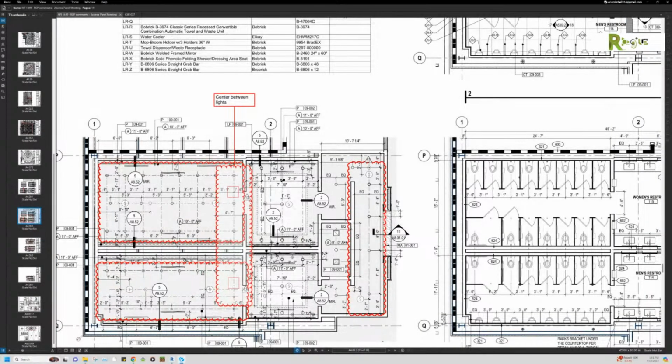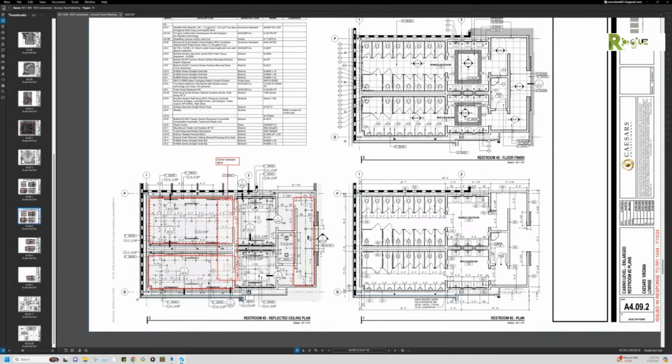That lighting doesn't match either. But we fixed those lights per what lighting we're seeing for what lighting is in the current model. But the lighting doesn't match the reflected ceiling plan. So in other words, him sending out this RFI 1449, Gaylord is not matching those lights.